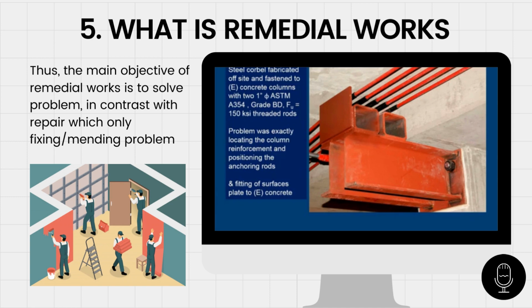Problem, of course, was locating the existing reinforcement because I didn't and couldn't cut that. We had to position these accordingly with properly constructed plates, and the fit up of the surfaces. Concrete surfaces are not completely uniform, and plates are pretty uniform, and we ended up doing some injection of the surfaces that didn't align completely. This was a construction technique that made this work.